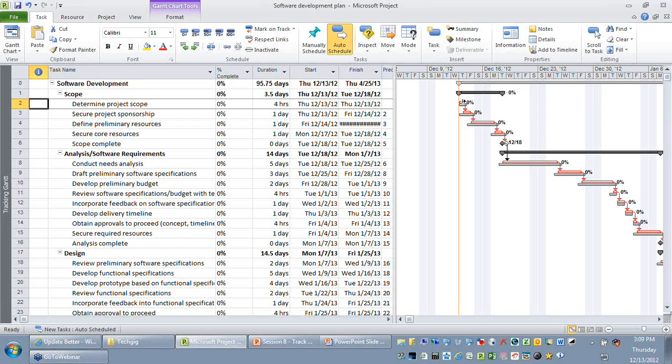What I recommend is not all the columns would be useful for us. The reason being, if you have prepared a schedule that is more duration oriented, naturally you might not want to record your actual work or your remaining work. But if your schedule is more effort oriented, where you have done an effort based estimation, naturally you might want to have your actual work in this case. So I'm just going to hide my actual work because let's assume we have done a duration based scheduling.